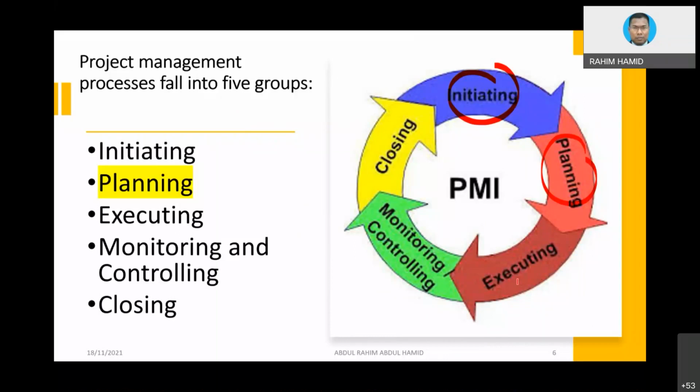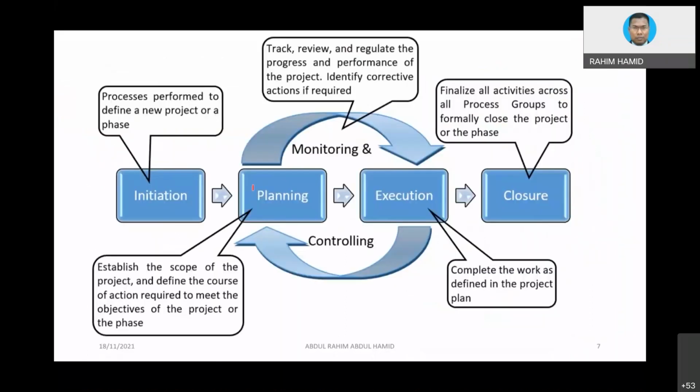We are not going to finish the whole executing process and then go for monitoring and control. No, they are happening at the same time. So planning, and then we execute. That is fine, that is the sequence. But when we execute, even though it is not completely finished, while you are executing, you are going to do your monitoring. Why? Because monitoring is the checking process. You do not wait for the work to be completed and only then check. At the end of the day, it's too late to react. So you need to monitor, and only then you control.